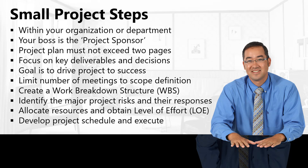Within your organization or your own department, select a small project. Your boss now becomes the project sponsor — you won't get a traditional project sponsor right away if you're starting with a small effort. The project plan must not exceed two pages, so keep it very straightforward and simple. Focus on the key deliverables and decisions, because those deliverables are what you can highlight once the project is done, allowing everyone to recognize the benefits.